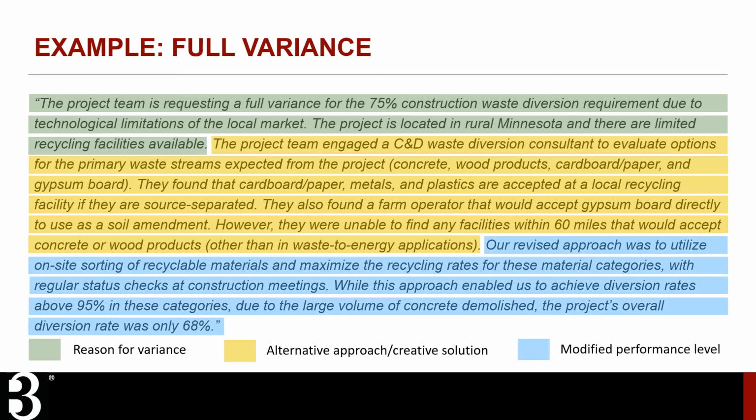Lastly, they identify their modified approach and performance level, maximizing recycling rates for all waste streams with local facilities or markets through on-site sorting and regular status checks at construction meetings to achieve high diversion rates for those materials, though not meeting the overall B3 diversion requirement.